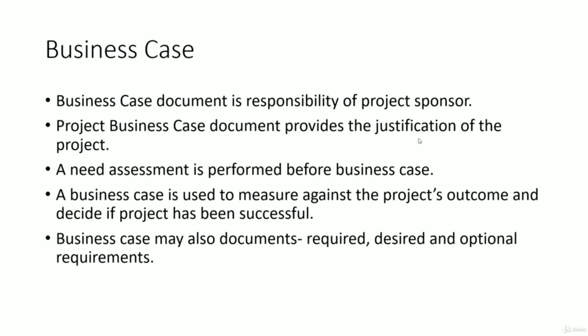The same document is also used for evaluation purposes. Let's say at the beginning we said that this is going to enhance our turnaround time, which is simply decreasing the time in which a user will be able to complete the process. Now, at the end of the project, we can measure and see if the process is quicker or slower. I'm just taking a very high-level example. In reality, we may end up having a specific time and all those details. All of that will be part of the business case.